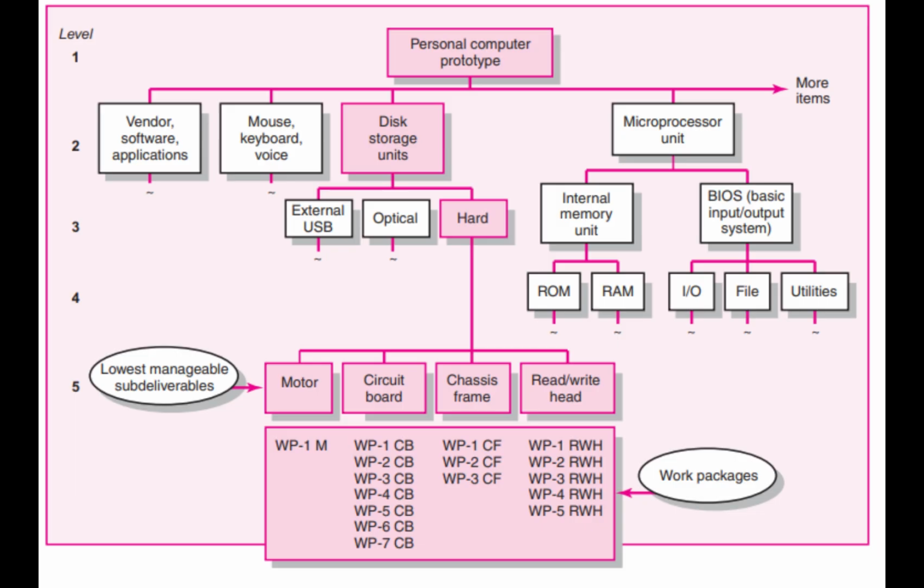According to Larson and Gray, 2011, each package in the WBS defines the work, what? 1. Identifies the time to complete a work package, how long? 2. Identifies the budget based on phases to complete a work package, cost. 3. Identifies resources that are required to complete a work package, how much? 4. Identifies the person in charge of the work unit, who? 5. Identifies the monitoring points to measure progress, how well?